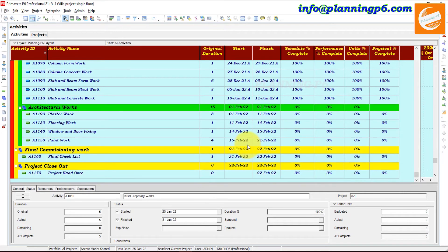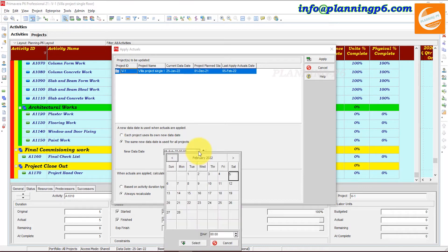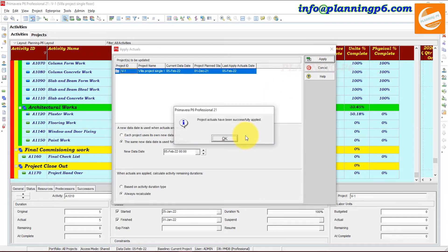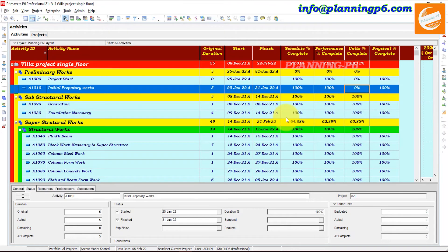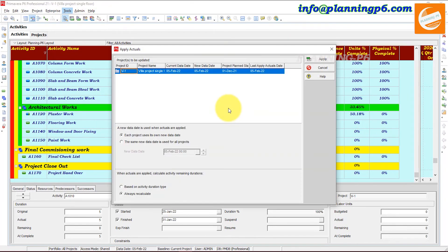Go to Apply Actuals again. You can see the Last Apply Actuals date it was applied up to the previous data date. Now we will apply with the 5th of February date — select 'Always Recalculate' and apply the actuals. Now you can see the actuals are applied up to 5th of February. The duration will remain the same as whatever you planned.